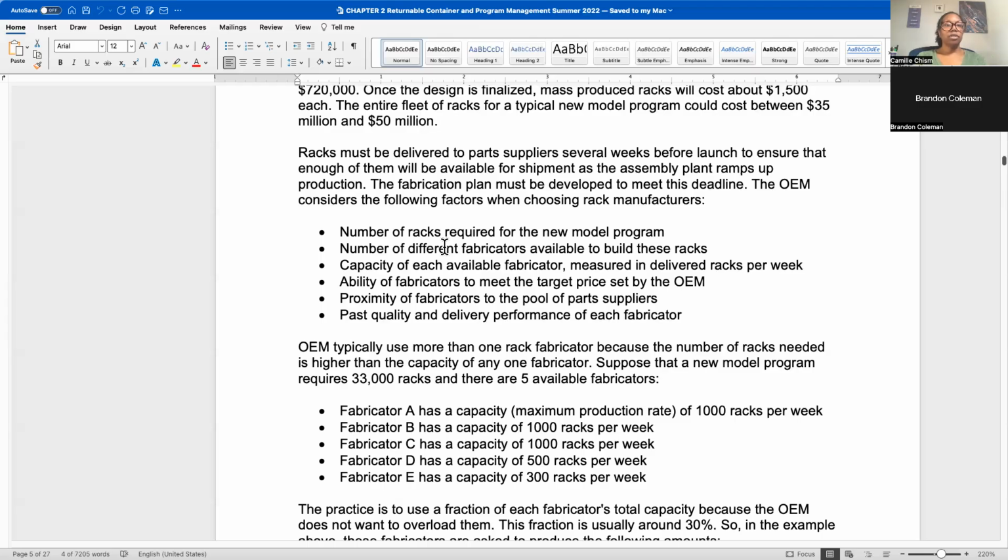They'll look at issues, and when they have a problem or defect, they have to go through a whole process of root causing out what the defect is, and not just for packaging, but for parts. What was the cause, and then how will it be resolved, and how will they make sure it doesn't happen again? And they're scored on not just how many defects they have, but how they respond and have they resolved these defects. So they have a scorecard.